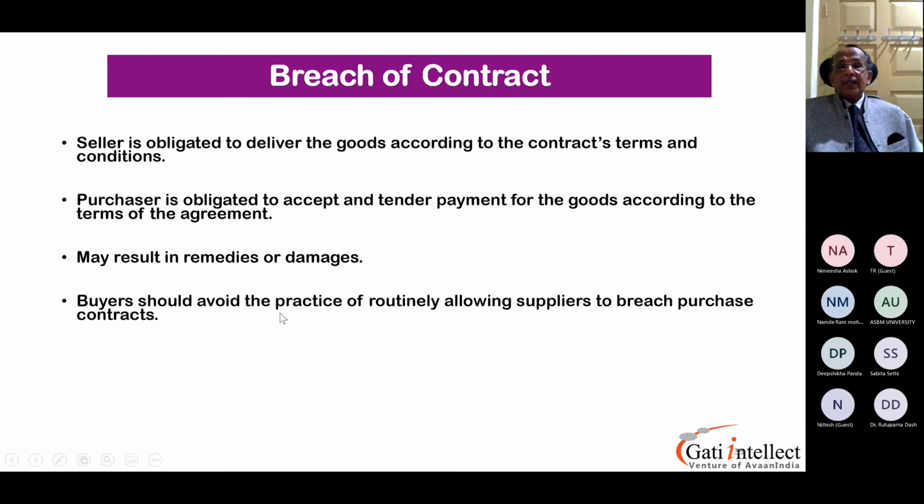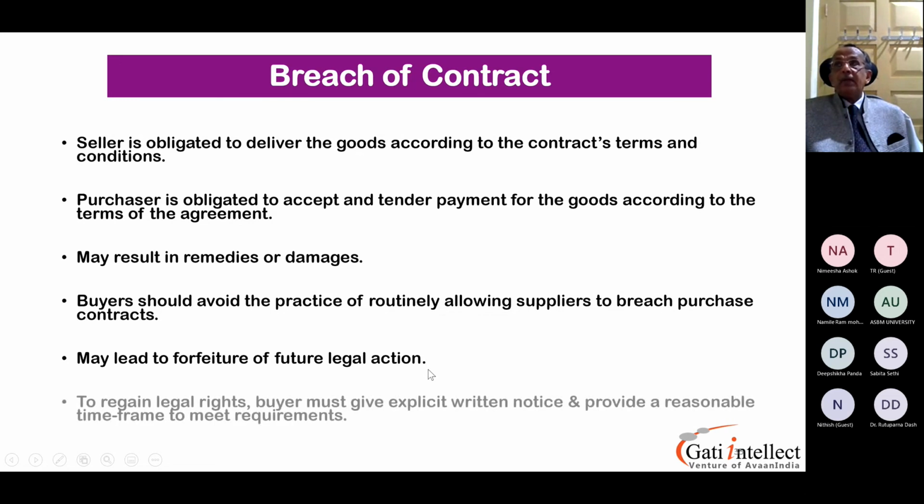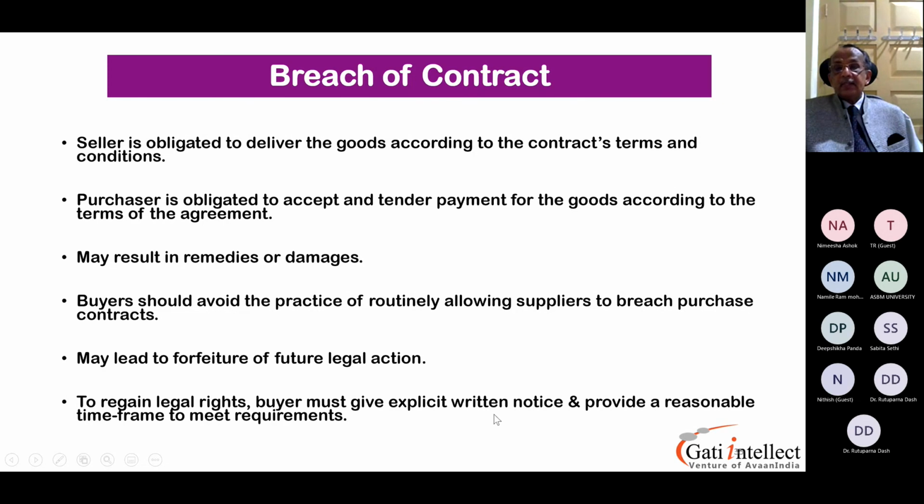Buyers should avoid the practice of routinely allowing suppliers to breach purchase contracts. This is what I was just talking about. It may lead to forfeiture of future legal action. So if you resort to this, you forfeit the right of legal action. To regain legal rights, the buyer must give explicit written notice or provisions to meet the time frame and the requirements.